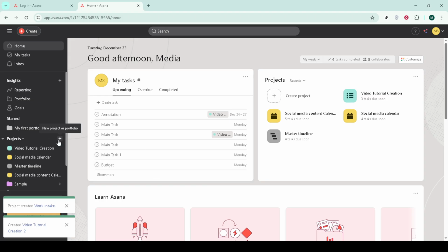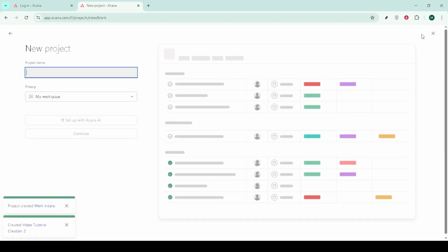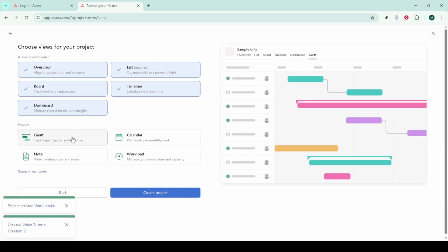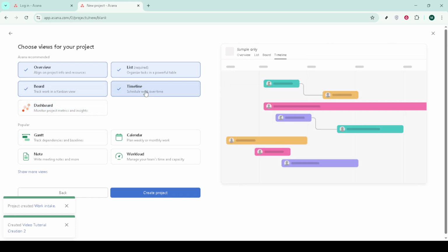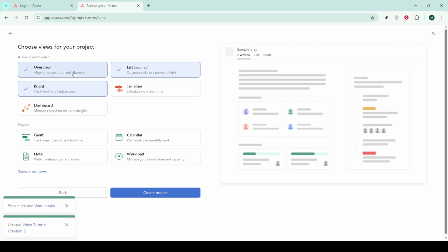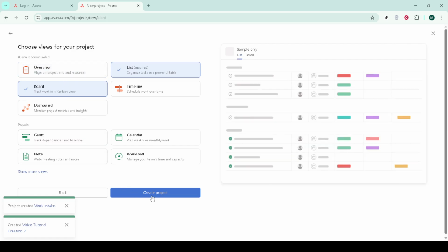We'll build everything on top of Asana's boards, since the column-based layout mirrors a Scrum flow and makes progress instantly visible. Create a new board project and name it something like Product Backlog. This is your single source of truth for all work that could make it into a sprint. In this board, add sections that reflect your life cycle: backlog, to refine, to sprint, in sprint, and done.